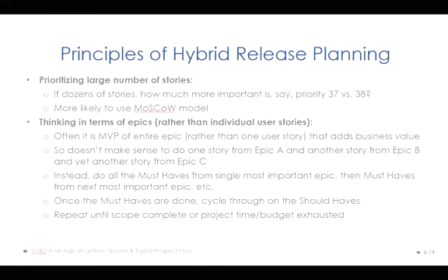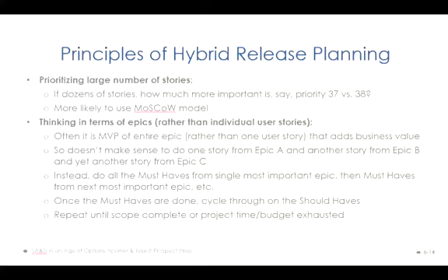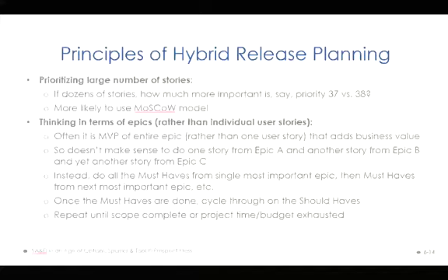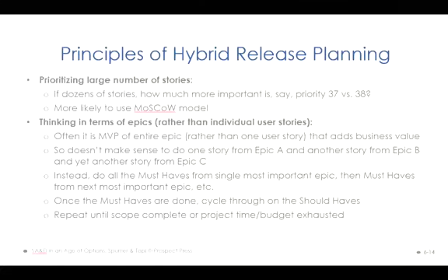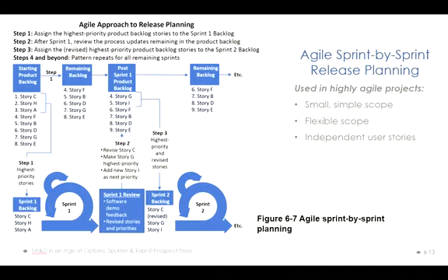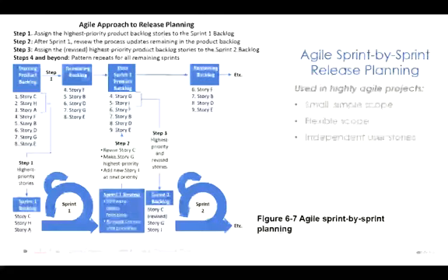Some of them are could-have or desired. Must-have are essential to your business operation. You have to do them. You have to complete them first. Something nice to have, you can always leave until later. So in the Agile methodology, again, we always try to complete the must-haves in every sprint cycle and leave the nice-to-have or could-have for a future sprint cycle.